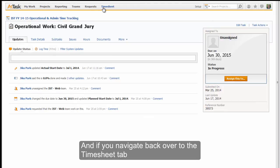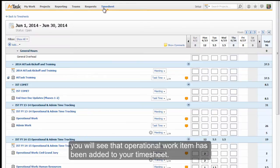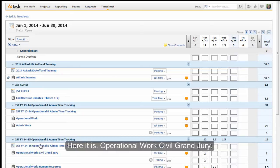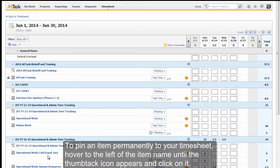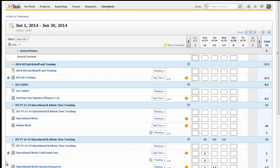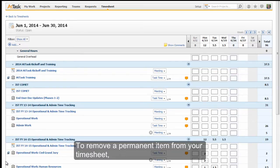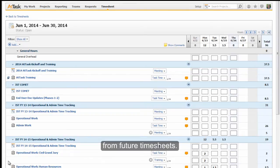If you navigate back over to the Timesheet tab, you will see that the operational work item has been added to your timesheet — here it is, Operational Work Civil Grand Jury. This item will remain on the timesheet until the end of this timesheet period. To pin an item permanently to your timesheet, hover to the left of the item name until the thumbtack icon appears and click on it. To remove a permanent item from your timesheet, click on the thumbtack icon and this item will be removed from future timesheets.